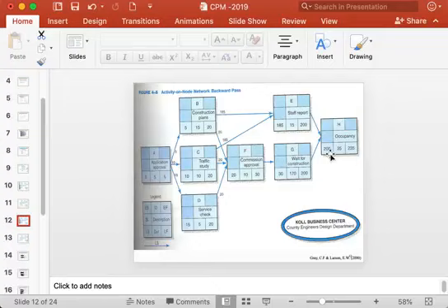So this means that in order not to allow activity H to delay beyond 235 days, it must start latest by 200. After 200 days, H will take its own time of 35 time units and finish after 235 days, which is the same 235 days that you found in the earlier slide.